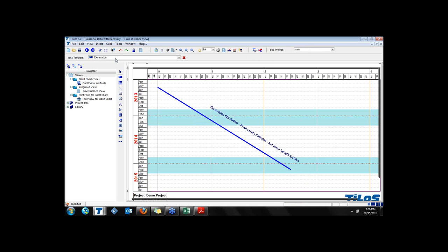at the same time and at the same distance, and we analyze how it will affect. Now, taking our seasonal data, please see that in the area where I am, my productivity rate has decreased, it is 400 cubic meters now.